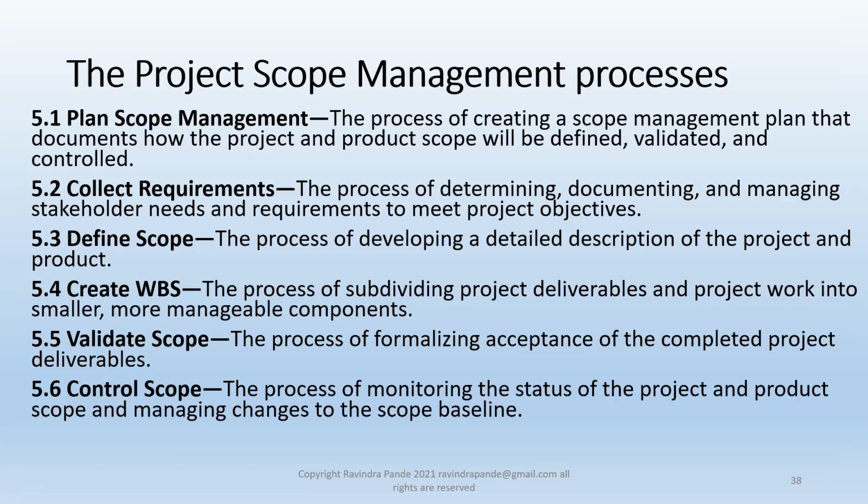So tasks like that might require some exceptions, in terms of this being a physical activity which normally consumes more hours than whatever we have planned. And while planning, you need to validate those things. You might break down the path from New York to Washington, Washington to Pittsburgh, Pittsburgh to St. Louis. Again, you might choose a different path and different tasks you can create in a task list. These tasks or decomposition depend on how effectively you have to control the project, how effectively you need to make sure in terms of measuring this task progress at a given number of hours basis.